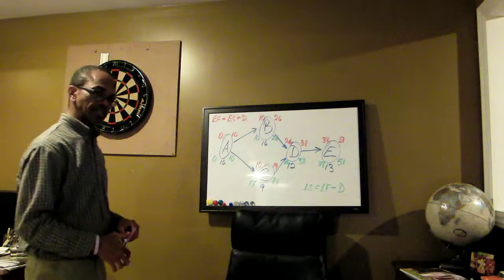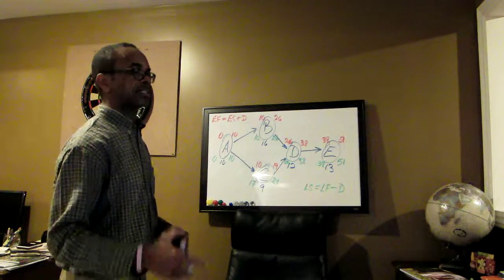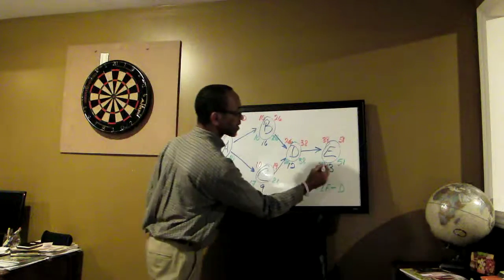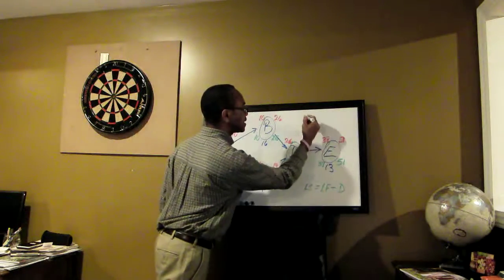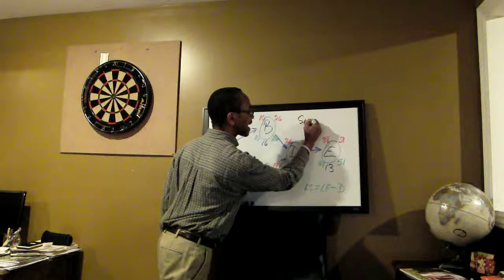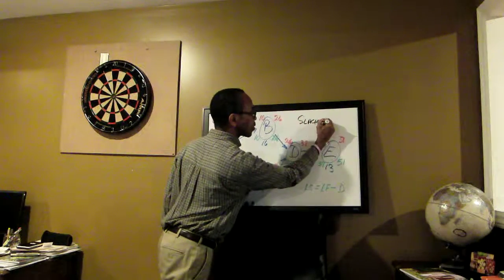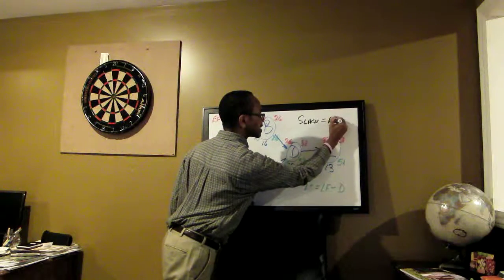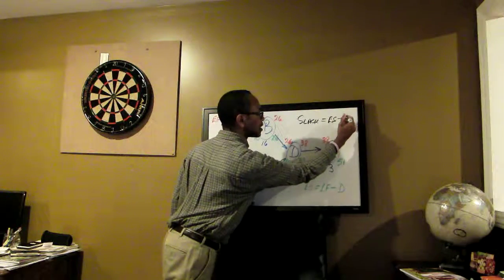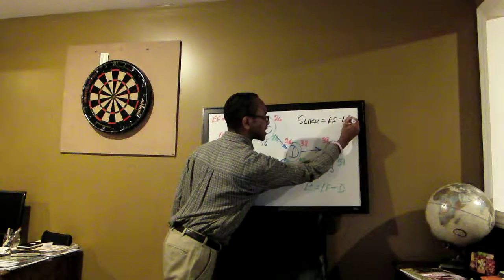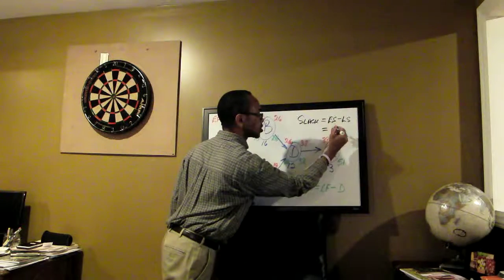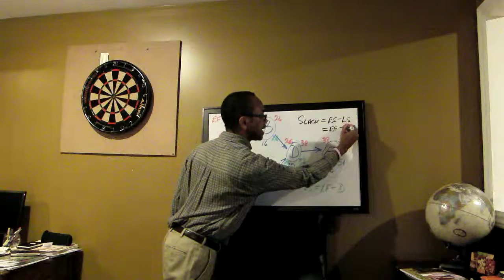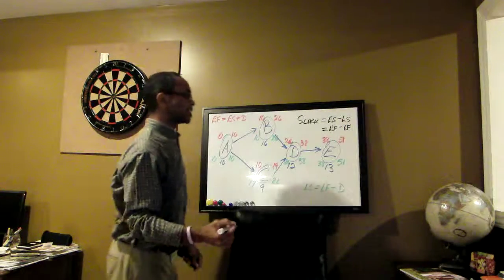The next step in the process is, can somebody tell me what the next step is? Exactly. We calculate our slack. So slack here is the difference between, can somebody tell me? Slack is equal to the difference between our early start and our late start. And it's also equal to our early finish minus our late finish. So let's apply it here.